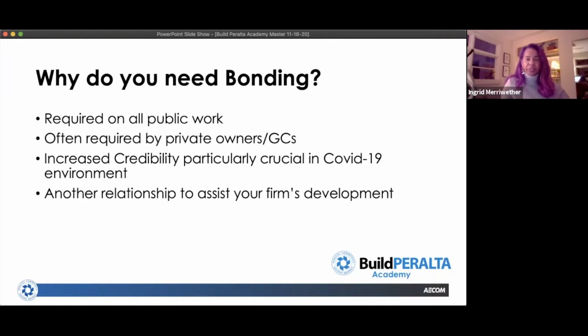So various public agencies, Alameda County, for sure the city and county of San Francisco, offer contract opportunities under $3 million. And in those cases, you can bid directly as a prime. But in those instances, you would be required to provide a bond. As a subcontractor, you may also be required to provide a bond if it's deemed a requirement at the discretion